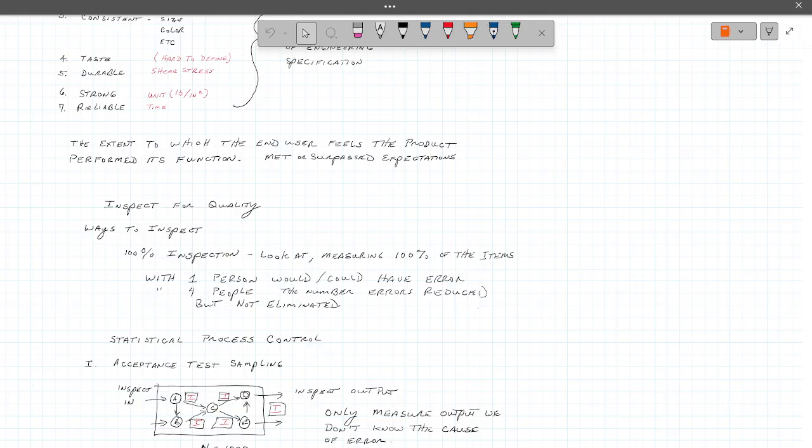But if I'm going to pour concrete, okay, and back off every truck, we do a slump test, right? Why? Because we want to verify what the concrete is that's going into that job. And I record that data. That's 100% sampling, but you're not doing anything other than recording it so you know what the record was in there. But let's say we're worried about, let's say Potsdam, no, it's not Potsdam, Upstone mixes the concrete for us. We're getting a little worried about them.